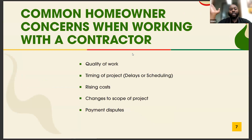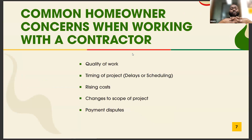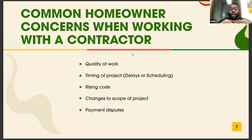Common homeowner concerns when working with a contractor include quality of work — even with a defined scope, things can happen. Timing and project delays can and probably will occur, especially with the current economic outlook. Today a project that might have taken four to six months in 2021 could now take eight months or more, not necessarily due to the contractor, but due to access to materials.